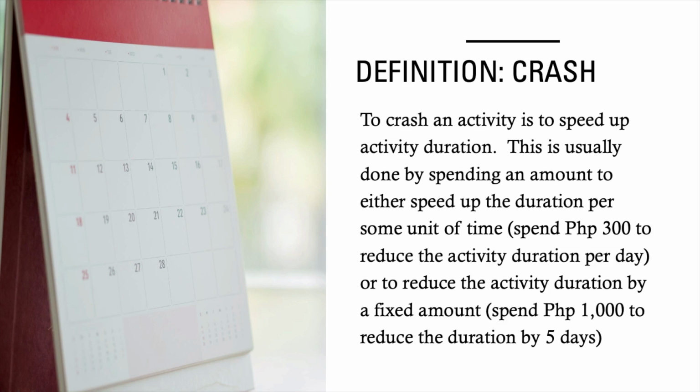On the other hand, it is very possible that they will offer you some deal wherein you bump up the cost to 150,000 pesos, and you will be able to get your yearbook in just 2 weeks. So there was a reduction of 1 week at the expense of an additional 50,000 pesos cost. Okay, you will see this in a lot of activities.